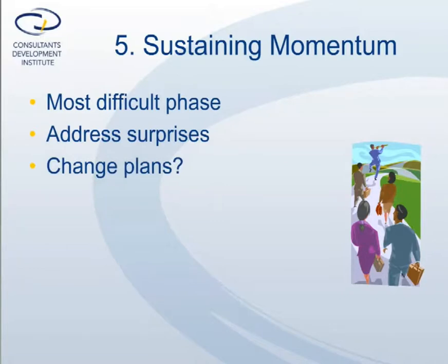Plans are rarely implemented exactly as planned, so during this phase, be willing to change the plans, but be reluctant to change them frequently, especially if the changes seem necessary because the project has stalled or stopped altogether. Instead, focus on the reasons for those problems and then promptly address them. If you have to change the plan, do so systematically. Clearly mark the changes in the plan document and distribute new versions of the plan. Explain why the changes were needed.